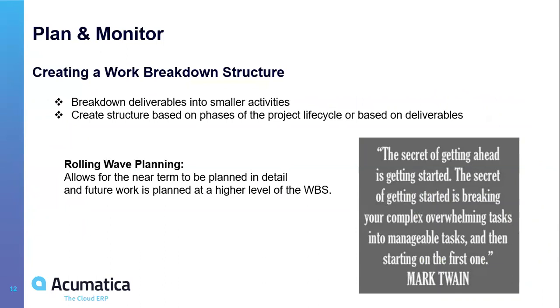So then, creating your project schedule. There again, the tool is not the most important thing. Our service estimator on the portal contains a tab with the schedule. You can use Excel for it if you are familiar with this. In my life, I most of the time worked with Microsoft Project, for example, and scheduled it there because it's easier to link different tasks. So if you postpone a task, it will show you automatically how it is affecting other tasks that are related to this task that you postpone.